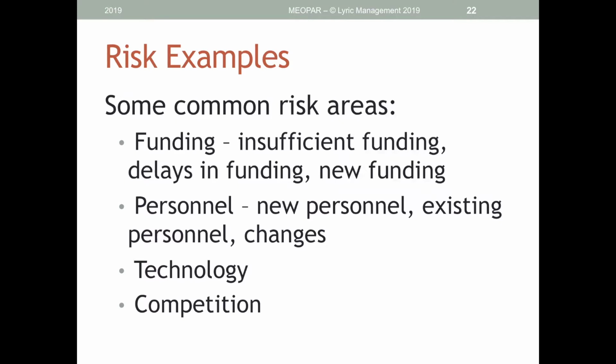We could also have opportunities that come in as a result of the initial stages of the work that we do. We're able to garner additional funding to support our project. And new or additional funding can represent a great opportunity to expand, maybe take on some of those desirable or optional requirements within a project that weren't necessarily considered before. But we do have to also consider the full breadth of the changes that we would be introducing with new funding. The probability that's going to happen, if it does occur, we can't count on it, but if it does occur, that's great. But we need to think about both the positive and the challenging impacts that new funding has. New funding brings new stakeholders to the table, which means additional requirements that we then have to incorporate into our plan.